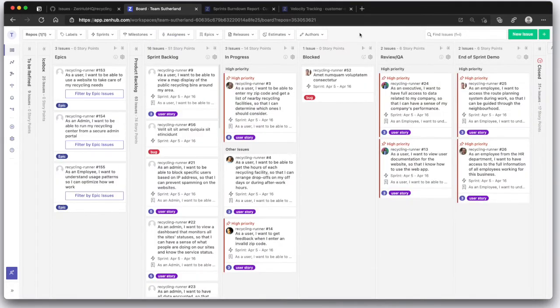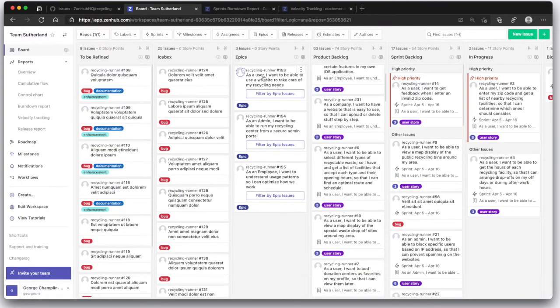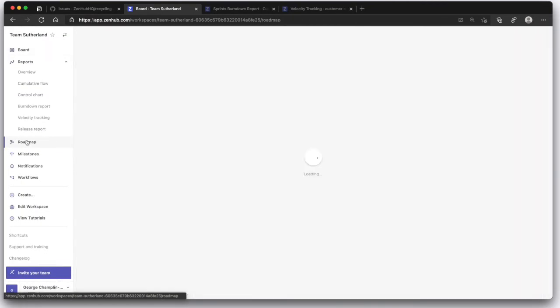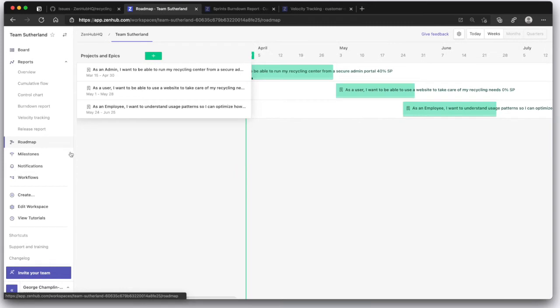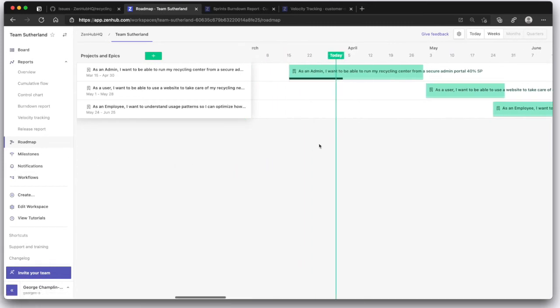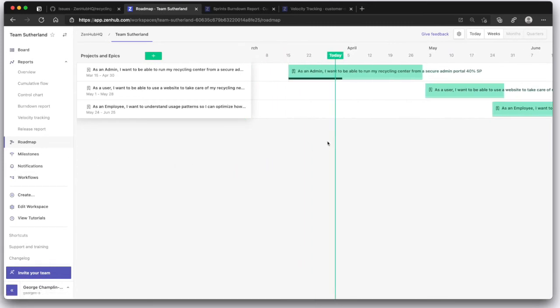Oh, and those epics that I mentioned, they power our roadmap. You can very quickly see at a glance the status of longer term projects. The roadmap works like a burndown. If the progress bar is to the right of today's date, you are ahead. If the progress bar is to the left of today's date, you are behind.